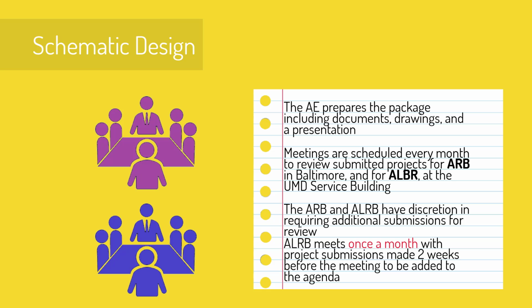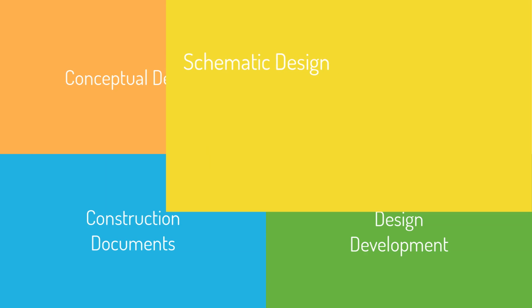ALRB only meets once a month to review, and project materials must be submitted 2 weeks before the ALRB review meeting to be added to the agenda.